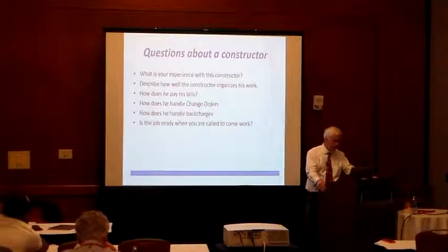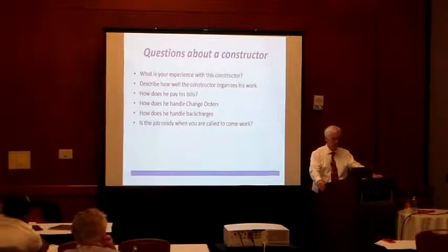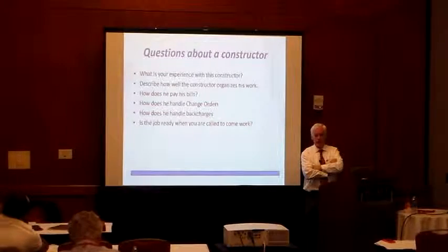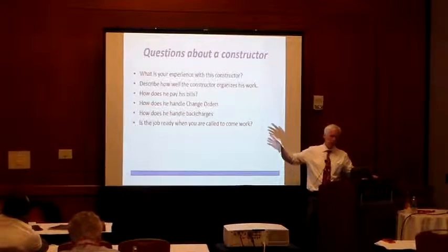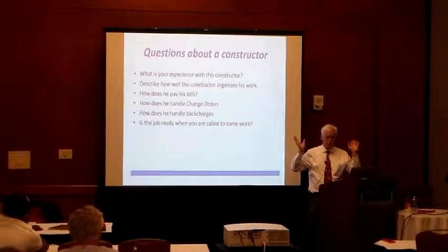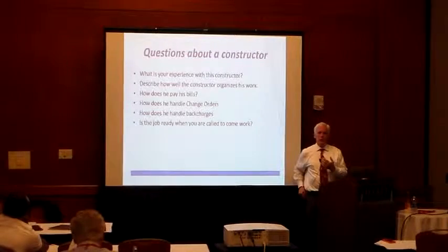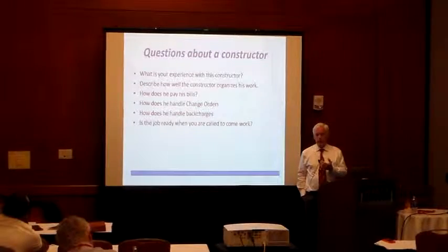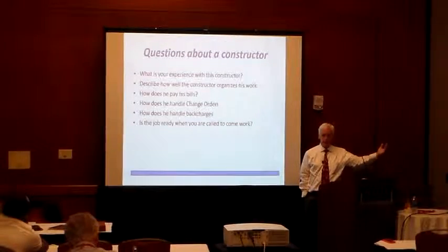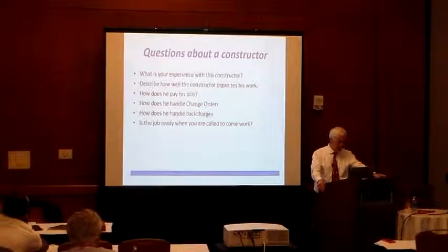So, questions about the constructor. Again, experience. How does a constructor organize his work? I would particularly ask this of trade contractors. If I'm a painter and I'm told by the project superintendent, you show up on the job next Thursday, and I come in next Thursday and there's trash everywhere, there's sheetrock that hasn't even been hung yet, there are plenty of rooms that just aren't finished, not ready to go, the job is not organized. If that's the reputation I have as a general contractor, the painting contractors are going to know that, and they're going to price the job accordingly. It costs me more to work for contractor A than it does for contractor B, so my prices reflect that. So you want to know which contractors are organized.